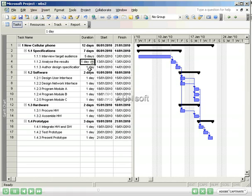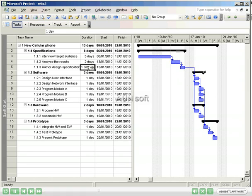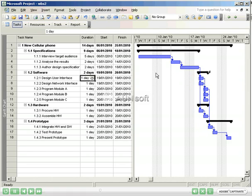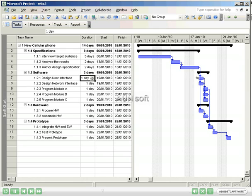I will go ahead and enter duration for the remaining tasks. For analyzed results, two days. Author to the design specification, two days. Now notice as I do this, in the timeline view, the start dates of the tasks continue to be moved out according to the durations that I've entered. And the connectors remain to the previously related tasks. This is because we had entered these relationships in the predecessor column in previous sessions.